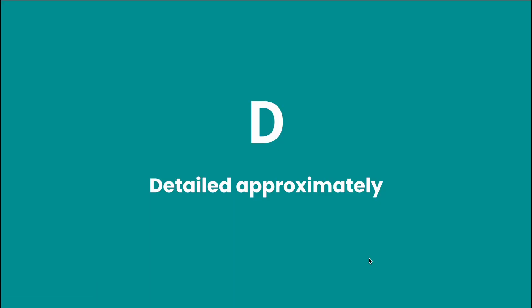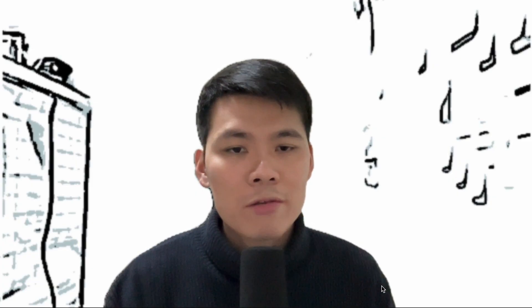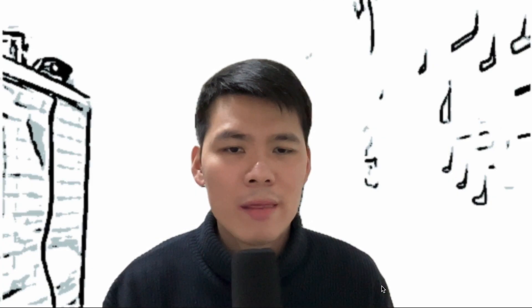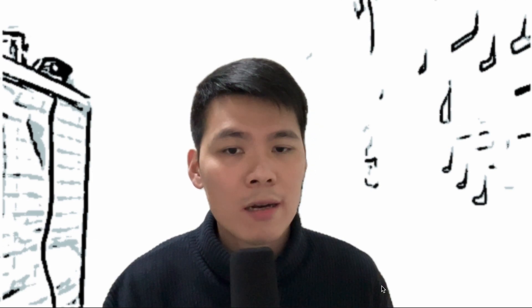The first letter means 'Detailed Appropriately.' I know you might have similar experience — when you are assigned a task, you cannot understand what the task is going to achieve, or it even directs you to a wrong result if you do it without further consideration. In general, a detailed product backlog has some basic elements: who to serve, action to take, and the result to achieve. If you'd like to go deeper, we could talk about how to well-structure your backlogs, but that's beyond today's topic. We focus on attributes now.